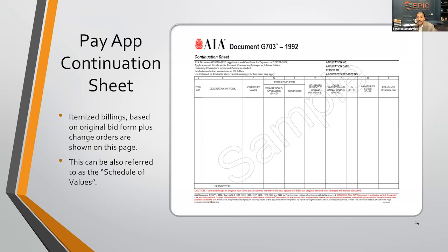If it's going to be a very material heavy project, let's say you're going to be removing and replacing all your sliding glass doors, for example, you better be seeing associated receipts for those hundreds of sliding glass doors, or however many there may be. And if those are not installed, then that should not be a 100% request payment item at that point in time. This can also be loosely coined as a schedule of values as well.